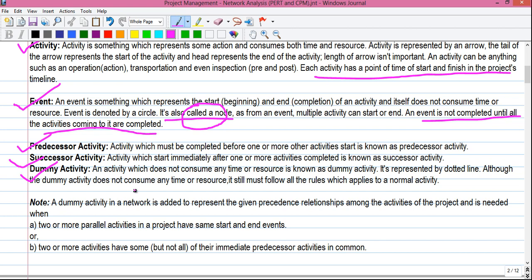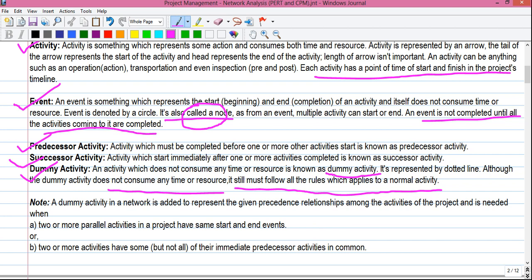The third type is dummy activity — a special activity that does not consume any time or resource. It is represented by a dotted line. Although a dummy activity consumes no time or resource, it must still follow all the rules that apply to a normal activity. A dummy activity is added to a network to represent the given precedence relationship among activities — it is needed when two or more parallel activities have the same start and end events, or when two or more activities share some but not all of their immediate predecessor activities.